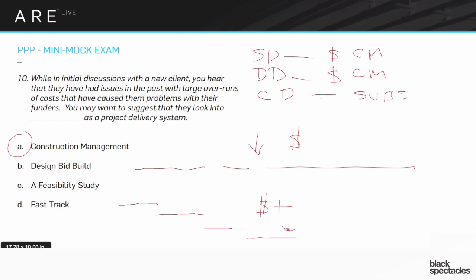The big disadvantage is, the big advantage of the design-bid-build is that I go through this big, long process, but I also have bidded out to many different contractors. And so I actually do get a very clear idea of which is the low bidder. But as we said in one of the earlier questions, I also often get to a situation where I get to the end of the bidding and it's just all too expensive. And now we have to go back and start again and redo the drawings and go through the bid again. So while I have certain advantages of getting the low bid from the design-bid-build, there's a bunch of disadvantages as well. So in this scenario, really the best answer is to suggest that they do construction management.